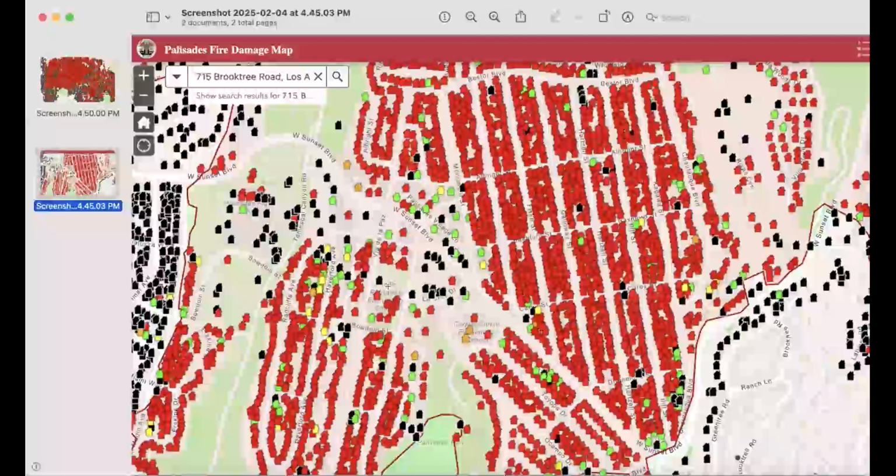People couldn't deviate because they were building 80 homes. They had to keep it moving to meet any kind of reasonable time frame. But the other people, not in those 80, maybe 88, I can't remember, were allowed to explore and do slightly different plans, add solar, add this, add that.